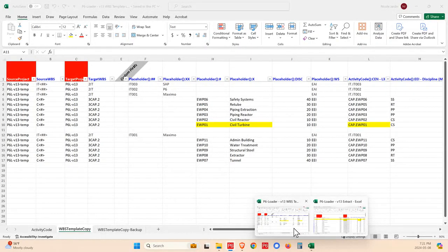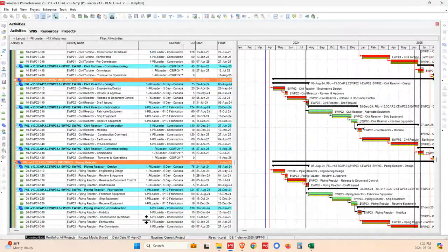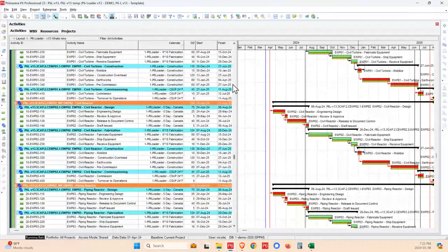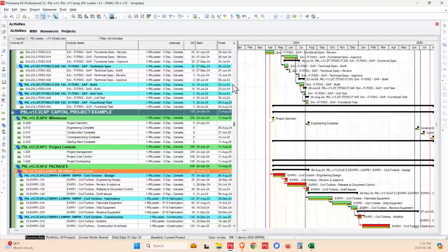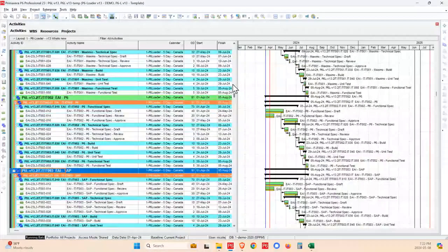So we just deleted everything and reloaded. And we could reload a few hundred packages in a few hours. It's incredible the amount of effort that we saved by having it. It was a big effort, period, but it saved a heck of a lot of time. And we would have probably needed five to six schedulers to do what 2 people were doing without the loader.